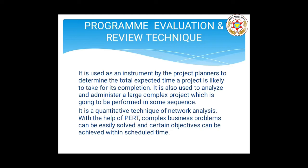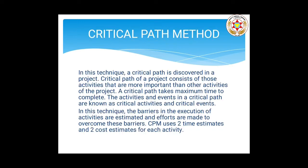Next is the Critical Path Method (CPM). In this technique, a critical path is discovered in a project. The critical path consists of those activities that are more important than other activities. A critical path takes maximum time to complete. The activities and events in a critical path are known as critical activities and critical events. The barriers in execution of activities are estimated and efforts are made to overcome these barriers. CPM uses two time estimates and two cost estimates for each activity. In the modern world, it is a unique technique of decision making used for project planning.